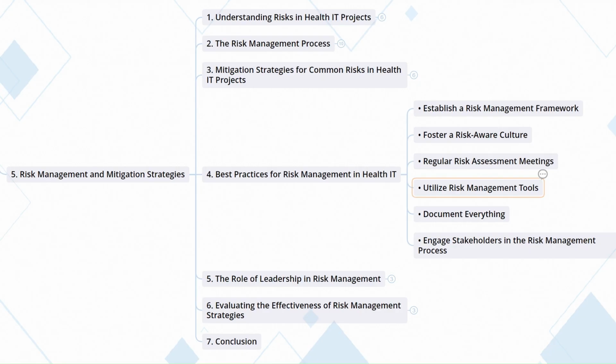Next, utilizing risk management tools. Employing risk management software can help streamline the identification, assessment, and monitoring of risks. These tools often come with features that allow you to create risk registers, track mitigation actions, and generate reports to share with stakeholders.